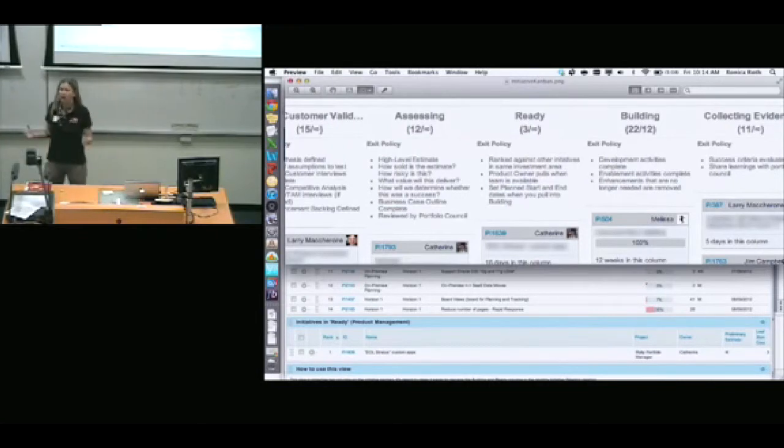And that turns out to be really hard, because I've got developers and project teams that have been really successful with Agile, but now I'm talking to people in the PMO and the business who have no idea what Agile is, and we're right back to having to prove the value. So you don't start with a complete redesign. It turns out what you start with is making work visible. We haven't figured out WIP limits yet, but what we have figured out is that it's really, really important to make all the work visible so that you can see it, and then to look at it every month.